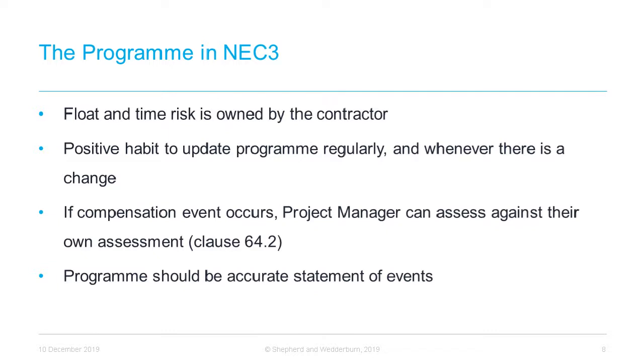So, when must the contractor submit a revised programme? A contractor can submit a revised programme whenever they choose, and can also be instructed to submit a revised programme. In any event, this interval should not be longer than what is stated in the contract data. Even though the contractor may revise their programme whenever they choose to, this does not lead to an automatic change in the activity schedule. However, it is a positive habit to update the programme every time there is a change.